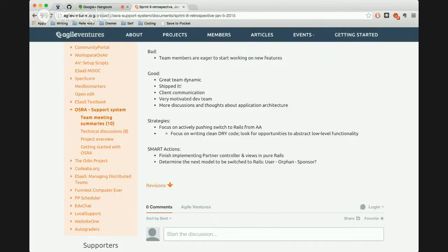I would say after, because that's the import process, which is tied very tightly to the orphan model. It relies on the orphan model already being implemented with all of its validations. Well, we're not going to change the model, though. No, we're not going to change the model, not for this task. I can see it being refactored, but that's separate. Yeah.